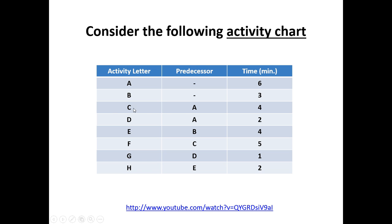So if we look for example at activity C, that tells me I can't commence activity C until activity A has been completed. I can't commence activity D until activity A is completed, and I can't commence activity E until activity B is completed, and so forth.